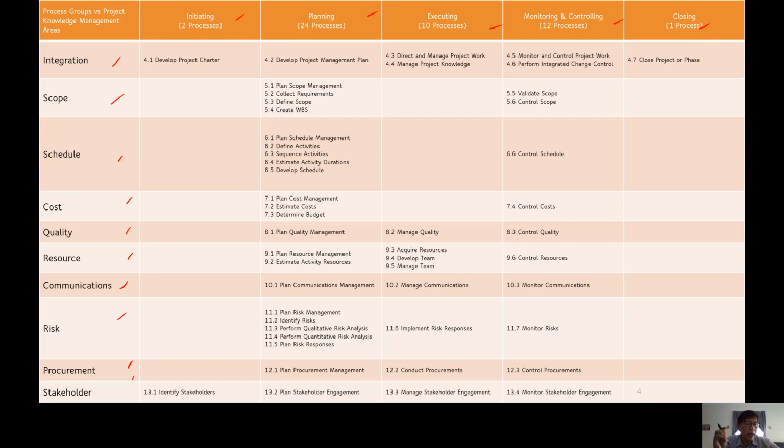And something that we would like to highlight to you is that at the commencement of a project, during the start times, what we will need to do is that we need to have what we call a project charter. So a project charter is akin to a birth certificate of a project. Without having a project charter, this project is not formally recognized. As such, the sponsor will not be giving you the money. So it will be the sponsor who will be signing off, or senior management.